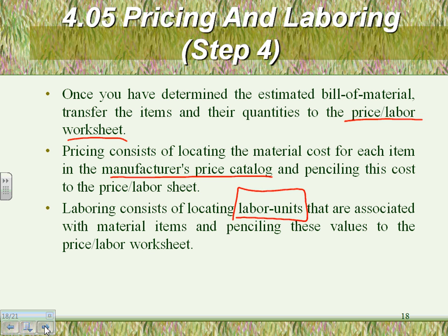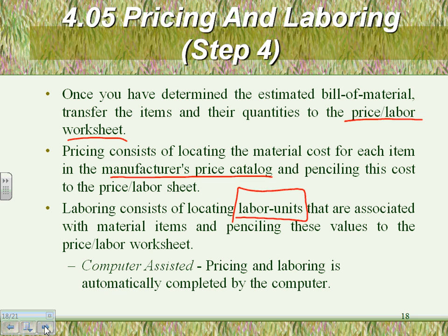Nika 1 will be the least hard work to do that particular job. So they go by labor unit and how hard the labor unit is. They slice it really deeper. So adding all this labor to the equipment is called laboring.